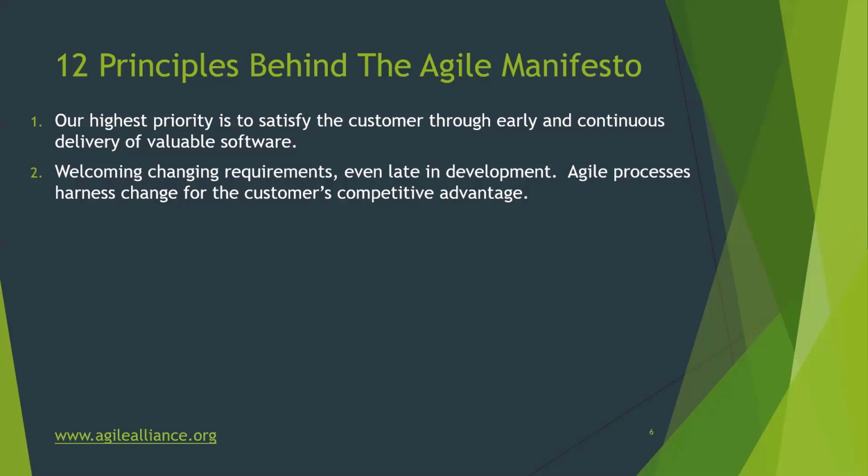So there's a basic concept within an Agile project approach to deliver a minimum viable product, which is an MVP. So you're going to keep identifying more and more requirements and grouping those requirements into what are called sprints, and delivering iteratively on those sprints and those requirements until you've achieved what's known as an agreed upon minimal viable product with your stakeholders. A minimal viable product is something that's usable and tangible by your users in terms of a product or service that you might be delivering.